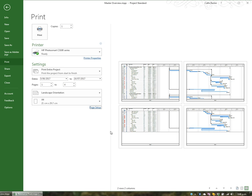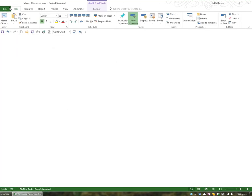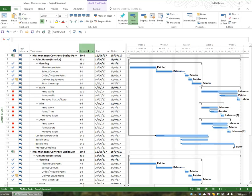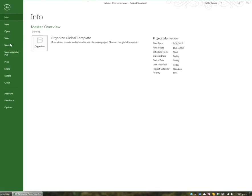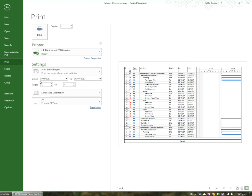I'm now going to control the date that it starts to print from. It's going to start printing from the fifth of the sixth. Now let's just back out of the print preview — this doesn't start till the twelfth of the sixth. So I'm going to go back to print preview and set it to print from the twelfth of the sixth.